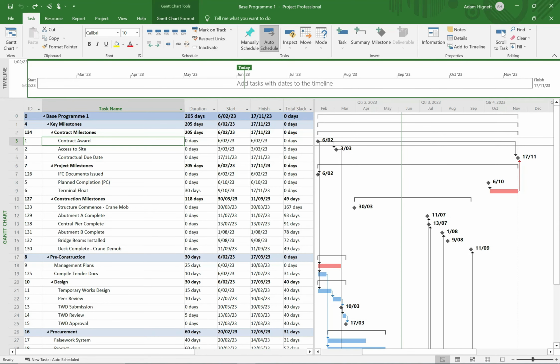Milestone tables can be a very useful tool for monitoring schedule performance. Of course, the program can do this by showing the milestones against the baseline dates. However, I always think there's benefit to extracting this information into a more user-friendly spreadsheet, where you can build up a table of important milestones that can be discussed in meetings or distributed internally or amongst the supply chain, or even printed and displayed as visuals around the office or even site.